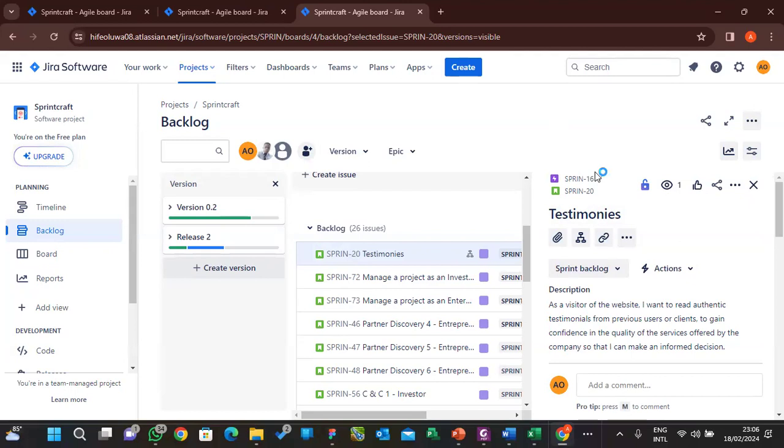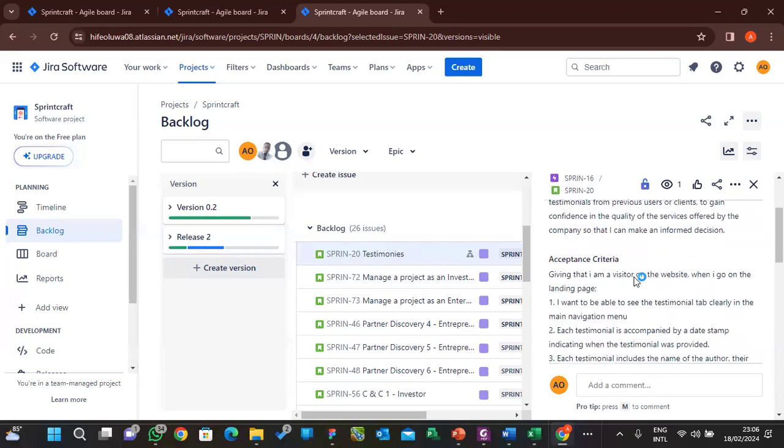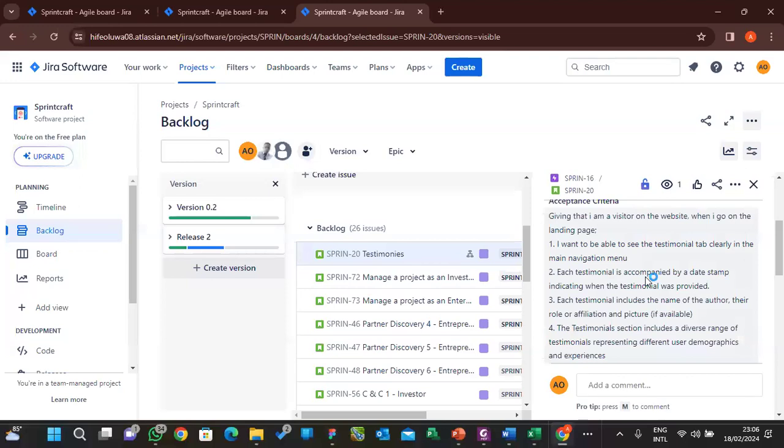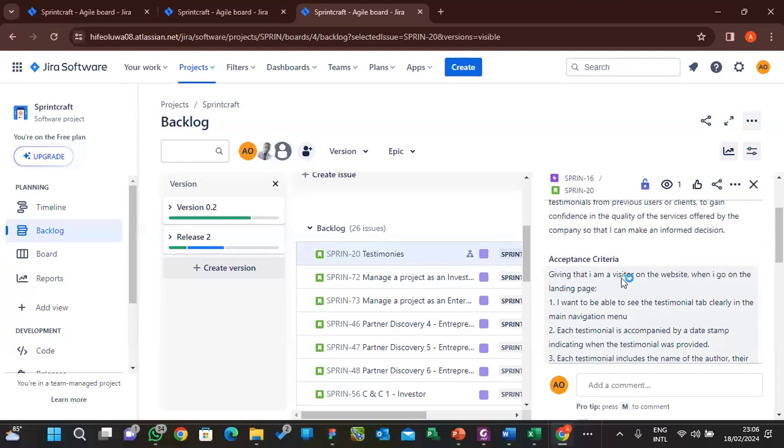They are assuming that they agree on 5. A situation whereby maybe you have five developers voting. So let's say 3 vote 2, while the other 2 vote 5 and maybe 1. Please, the question you need to ask as a Scrum Master, this is where conflict resolution comes in. You ask the person that voted 5, why did you choose 5? He will give you his reason, that because of the volume of work here, he has more criteria. I need to do this, I need to do that. Okay. You ask the person that voted 1, why did you choose 1?